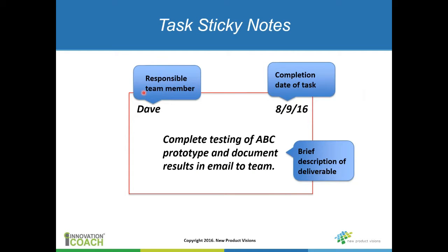So let's look at the particular stickies. They're very simple: a responsible team member, the date that they need to be completed, and a basic description of what that task is. That's all it is.